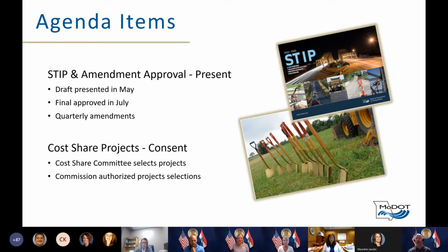Amendments are required for 4 main actions: to add or delete a construction and right-of-way project, to add or delete federally funded multimodal projects, to increase the budget when exceeding $1 million and greater than 25% of the original estimate, and to make significant scope changes with or without a budget change. Amendments require a 7-day public comment period, and projects that are in the MPO areas also require a separate MPO, governor, and WNDOT approval.